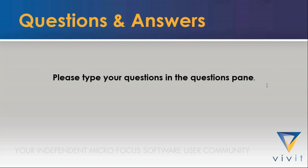But before we get to those niggling issues, as we were defining the business process and the business requirements, we were finding that people would request a lot more capabilities out of the tool, which, as part of our implementation approach, was not really part of the first phase. So we literally had to say, guys, please wait for phase 2. We will be able to deal with all those additional technological capabilities and requirements in phase 2. So the adoption phase as well was very good on our end and very quick, because